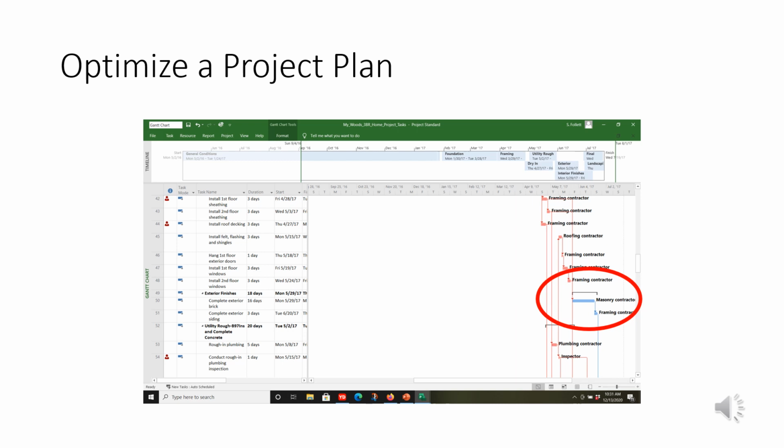And you can also see that we've got some non-critical tasks. These are tasks where if we miss the deadline, it's not good, but it's not going to affect the overall project duration unless it lasts excessively long. So these are non-critical. Also, if you look at those lines above it, that's where we did some resource leveling. And you can also see that we still have some burning men on this view. So even though we got the critical path, we still have some issues with the resources being over allocated. But these are non-critical paths, the blue, resource leveling, and also over allocation icons.